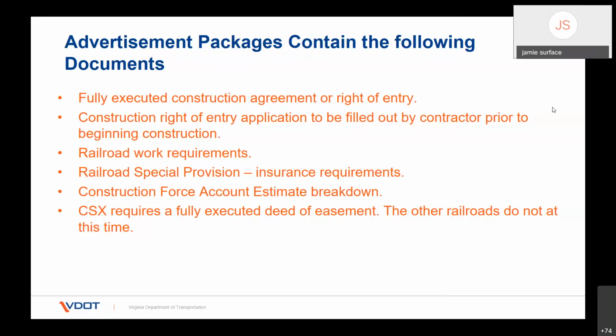The right of entry application needs to be filled out by the contractor prior to the beginning of work. So part of that advertisement package, there's an actual contractor's right of entry. That goes into the advertisement package blank. The contractor that's awarded the project fills that out.